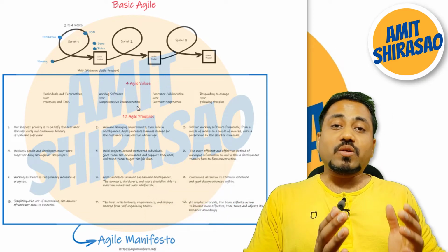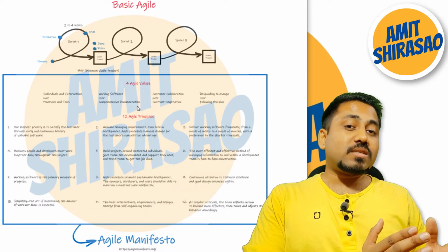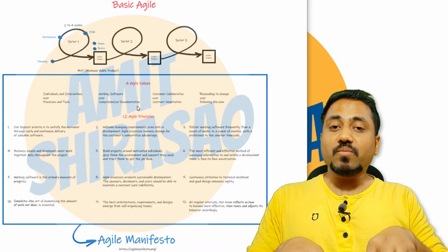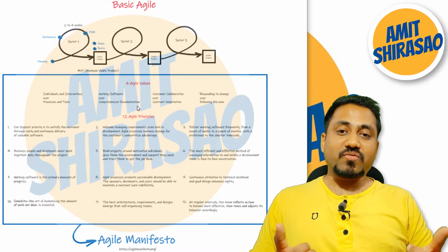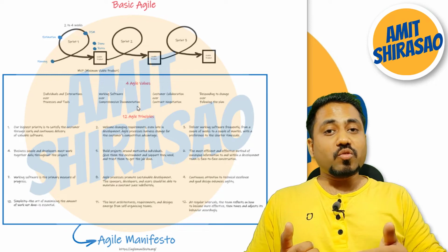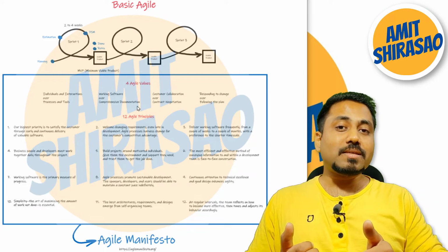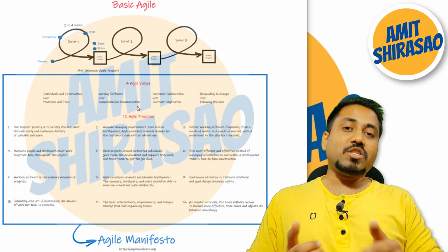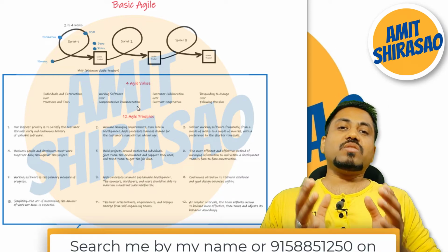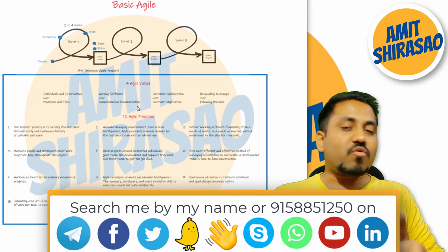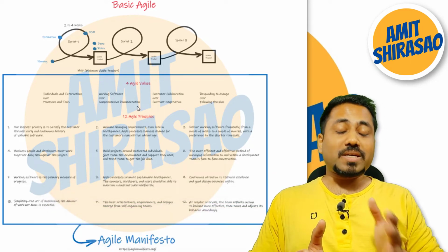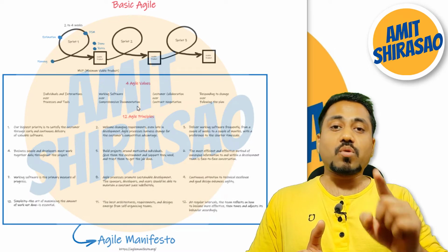At the end of the sprint, you're going to show a working product to the customer. You will be giving a demo to the customer on a working product. You will seek his feedback. He will approve or reject your stories, and then there'll be a sprint retrospective meeting as well. That means you will retrospect how this one fortnight went, what went well, what didn't go well, what can be done better the next time.